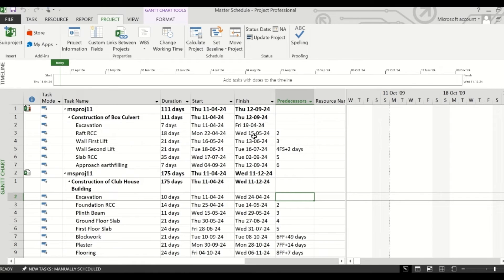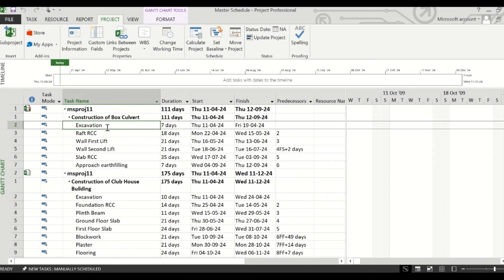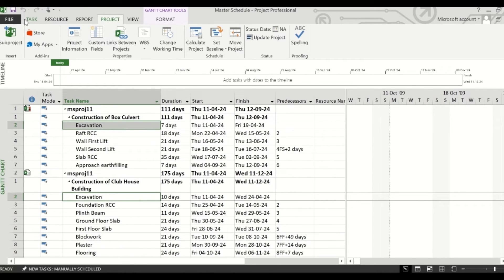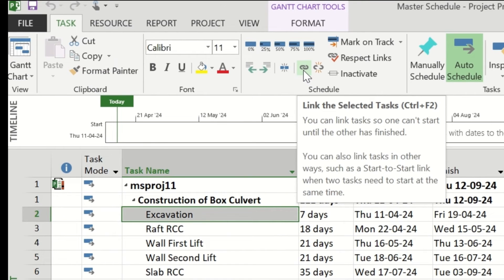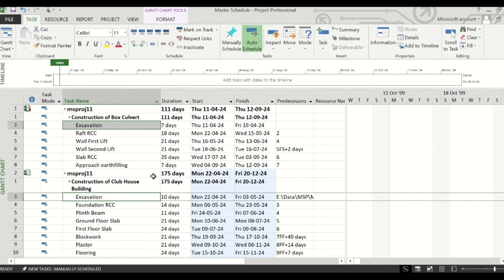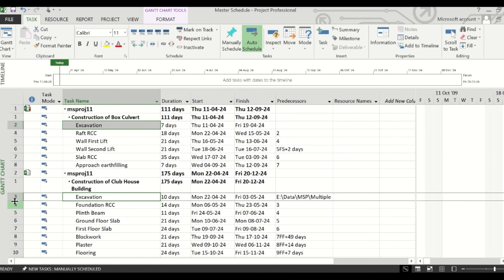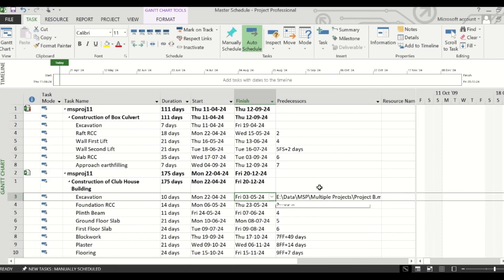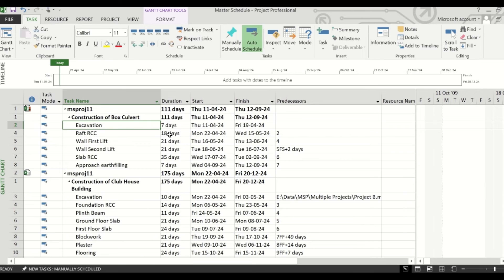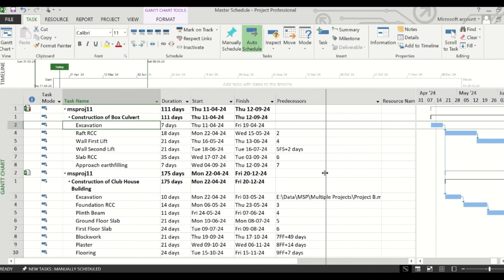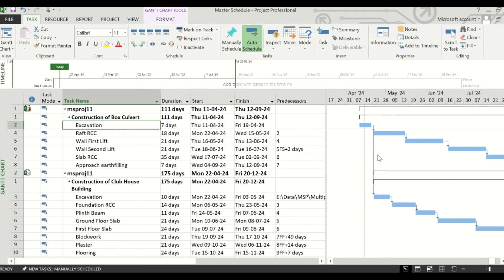So if you want to link a task from another schedule — meaning this task — with this task, you have to do something else. You have to press the Control key from your keyboard and select both the tasks, go to the Task tab, and from here click on the button which says 'Link the selected tasks.' Alternatively you can press Control plus F2. You will now see a change: this task has a different predecessor and it has created a link with the excavation task of the construction of box culvert schedule. If you check in the Gantt chart, you will also see a link has been created from the excavation task of the box culvert schedule with the excavation task of the clubhouse building schedule. This way you can link two tasks of different projects using this feature of MS Project.